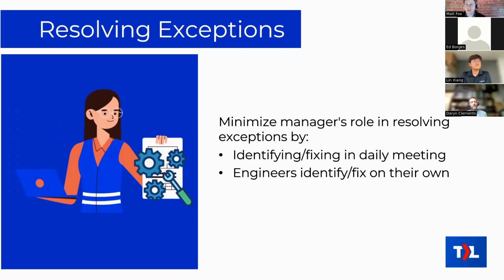And I wanted to make a note that as a manager, you can really minimize your involvement in fixing some of these exceptions in a couple of ways. One is by looking at a lot of these problems in a daily huddle. If those problems are apparent in the daily huddle, then you just deal with them all in that 5 or 10 minutes in the morning, and you're done for the day essentially. As long as you don't see them come back tomorrow with the same problem, then you're done, and you can have the rest of your day back. You don't have to be watching out for those sorts of problems.